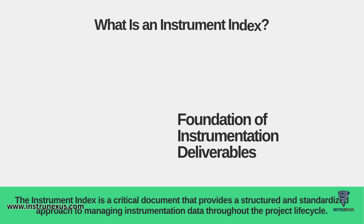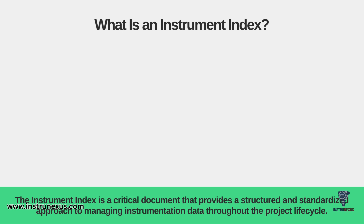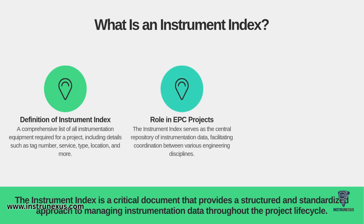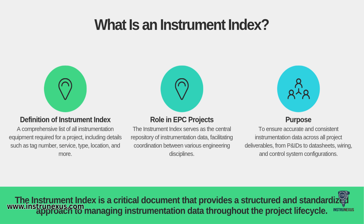What is an Instrument Index? At its simplest, it's a comprehensive list of every single piece of instrumentation equipment required for your project. This includes critical details like the tag number, the process service, the instrument type, its physical location, and much more. In an EPC project, its role is to be the central repository for all instrumentation data, facilitating coordination between all the different engineering disciplines. The ultimate purpose is to ensure accurate and consistent data across all project deliverables — including P&IDs, data sheets, wiring, and control system configurations.